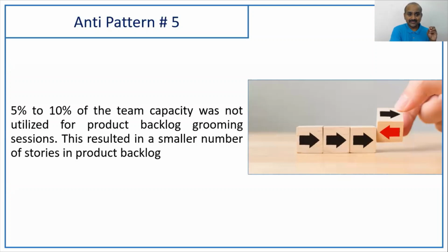We need to give importance there. If at all you come across situations saying that your product backlog is not properly groomed, rather you run a sprint zero and just groom stories so that at least for the next 6 to 7 sprints stories are groomed, and then you start running the session in the mid of the sprint so that always you have user stories ready for the next 2 releases.